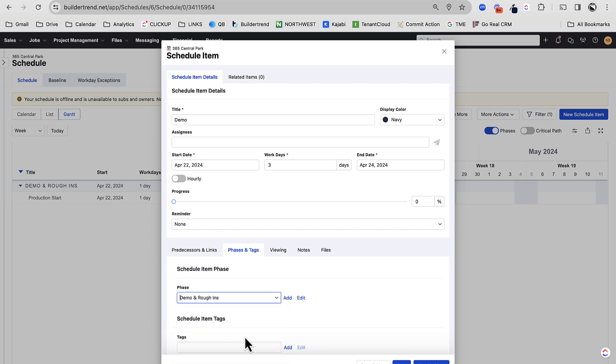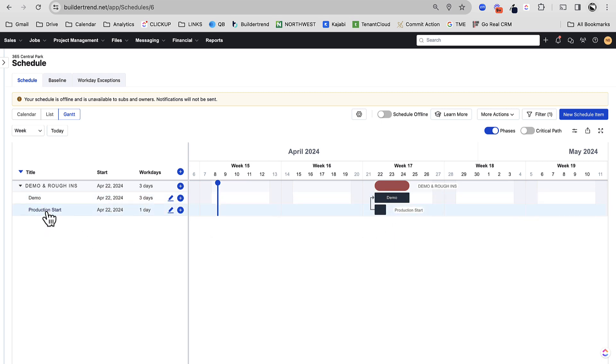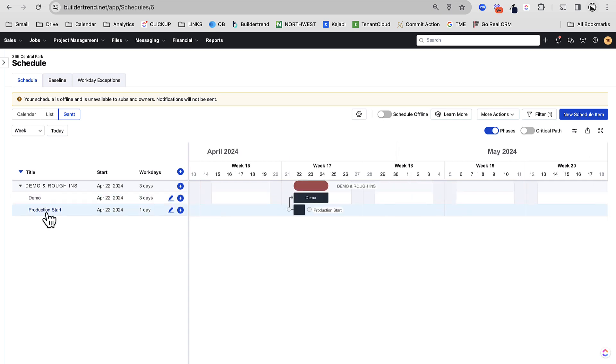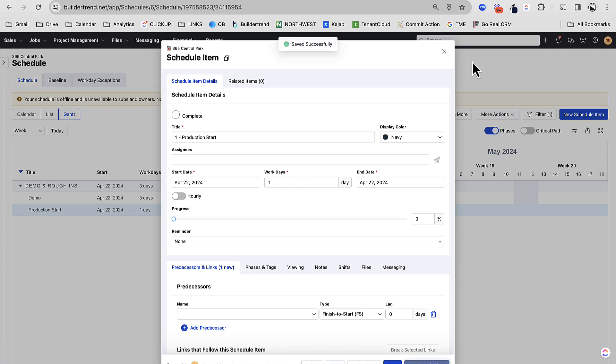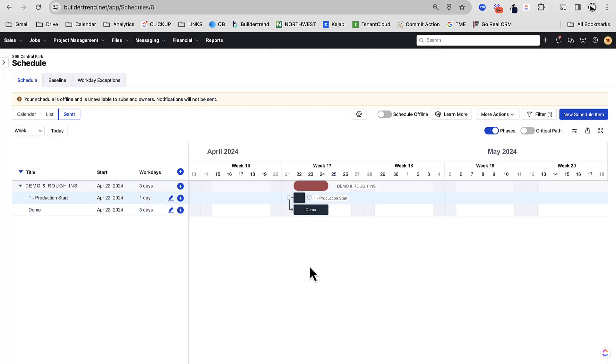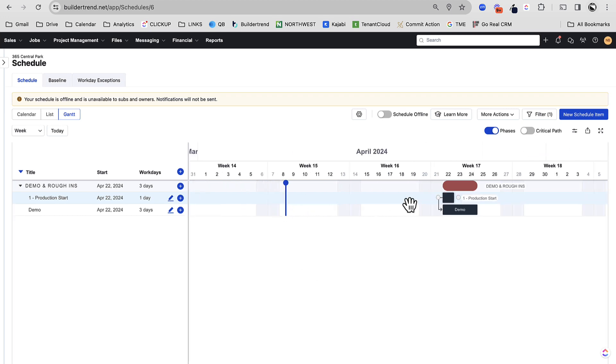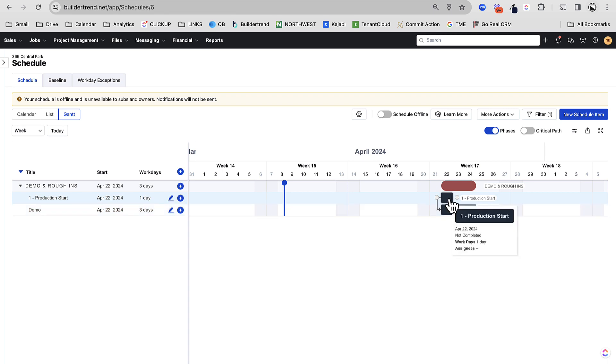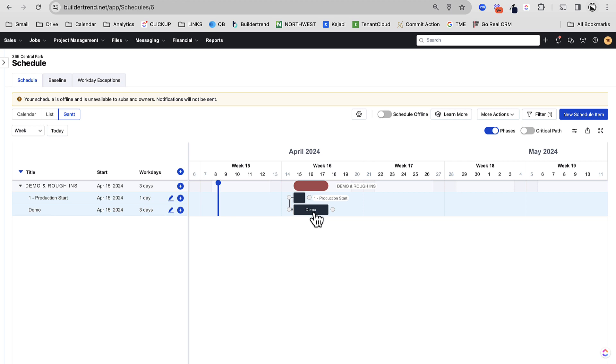I'm going to make sure it's added to the right phase there, demo and rough-ins. And what you can see is the little line that happens. Now, one thing I do, because Buildertrend's going to sort this alphabetically, I'll usually create this task and do a one, because I like to see it at the top. So I'm just going to do one production start, and then you can see the start to start dependency. Now, why I love doing that is that, and this is what's so powerful about the whole schedule, even when I move this production start out or in, it's going to bring the entire piece with it.